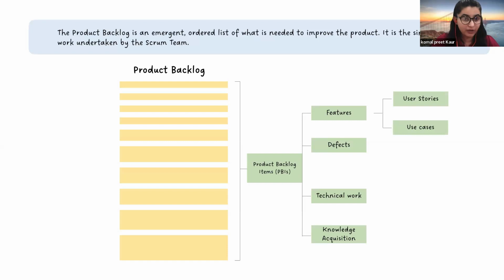Like, why do you want to develop a login? So the syntax is: as a user, or as an end user, because I want to use a food delivery app, I want to log in so that I can order my food. So as a user, I want to do this so I can do that, right? There are three things in that. So this is what I did. There is one login page feature, but I just elaborated a bit.